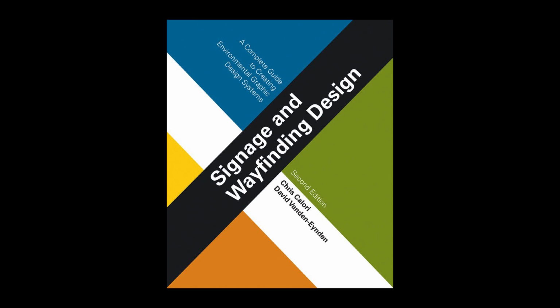Obviously, production prototypes are usually submitted after all the other submittals have been approved, giving the fabricator the green light for actually producing the signs on a trial basis. Approved production prototypes then become the quality standard for the remaining production run, but may also be part of the total sign product the fabricator delivers and installs. Submittal review is a checkpoint process that facilitates coordination and helps catch the mistakes, inaccuracies, and defects and resolves misunderstandings before the sign program is built.